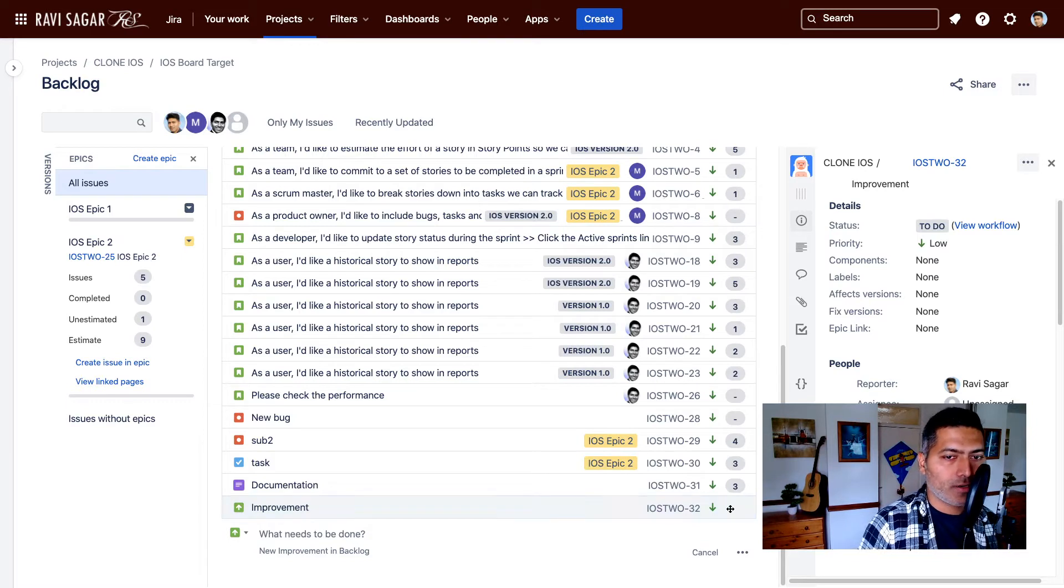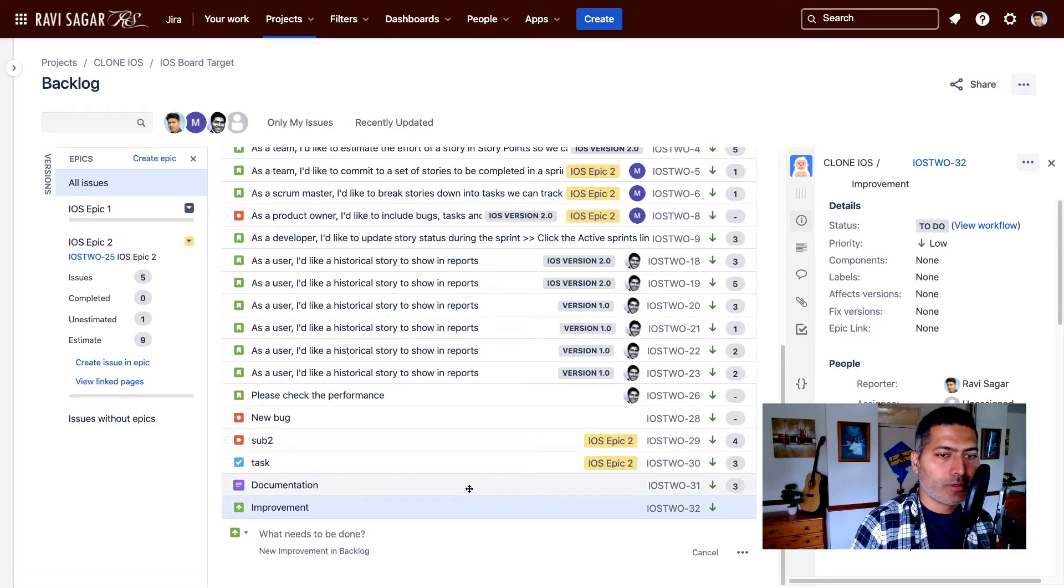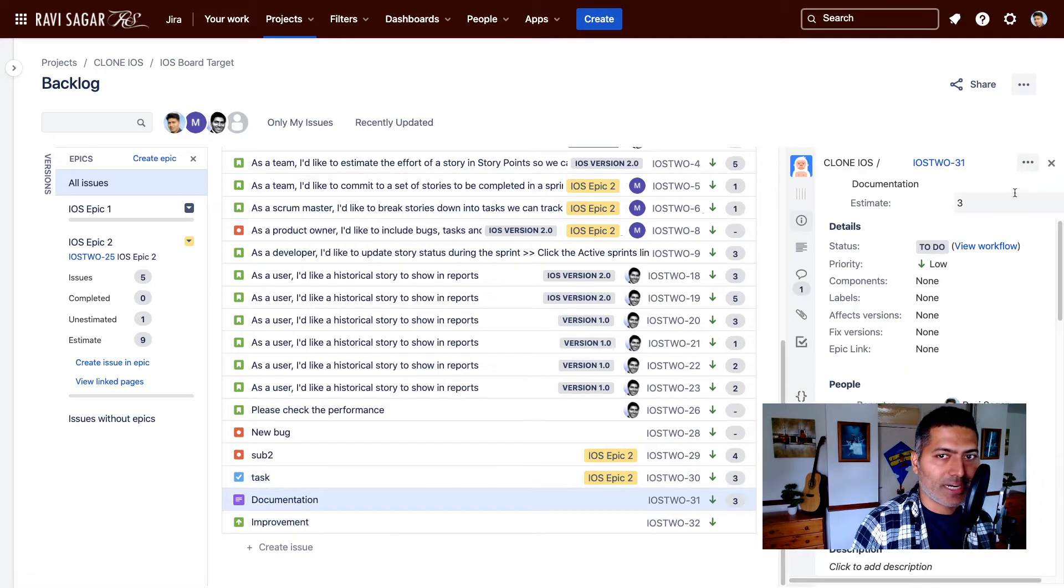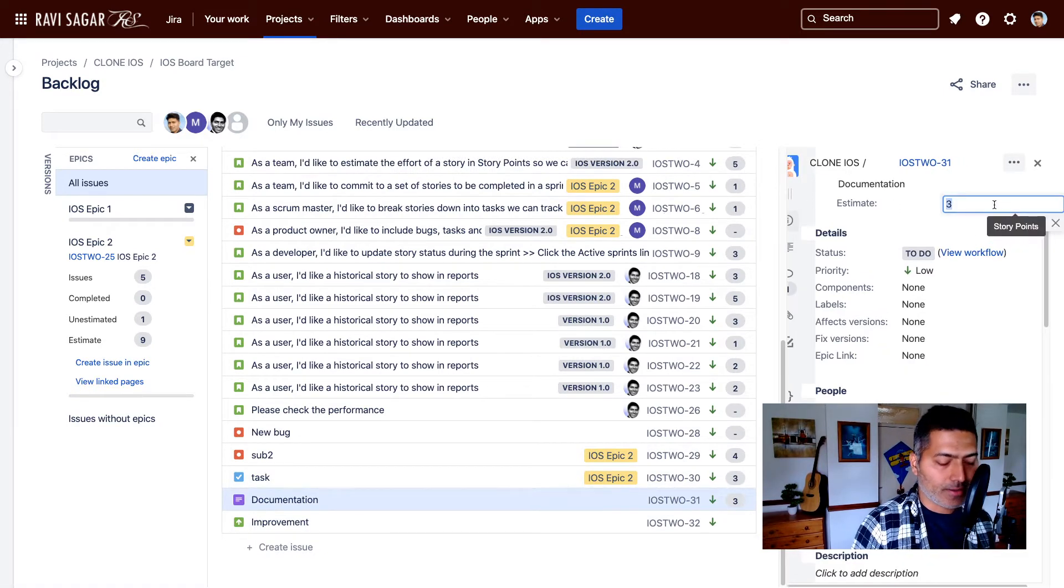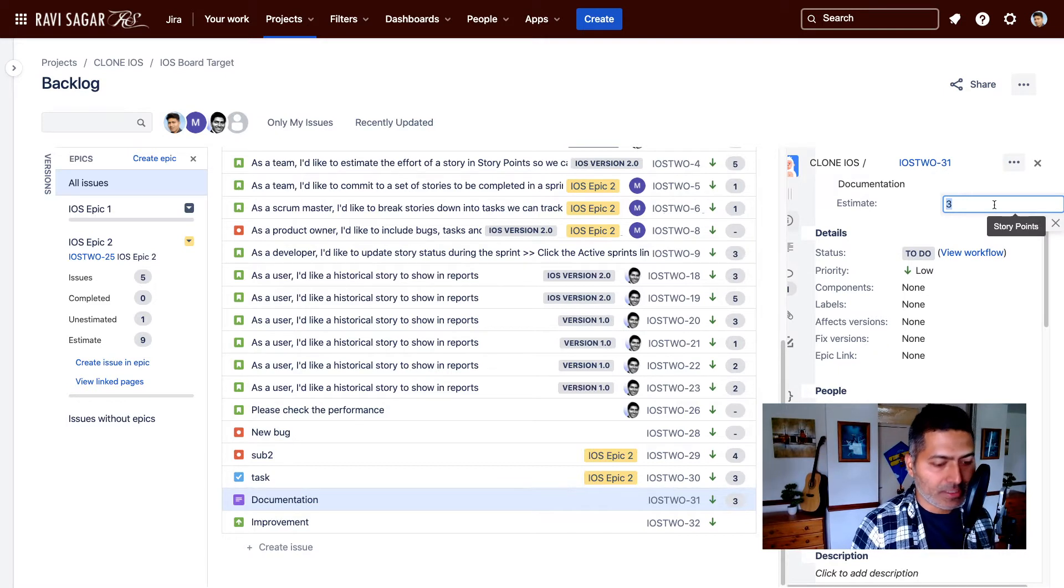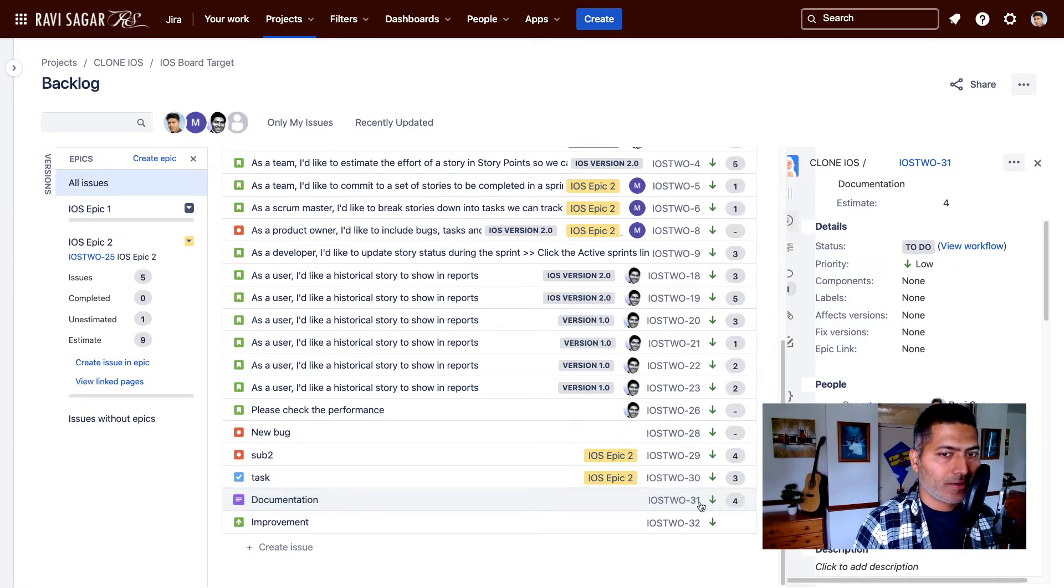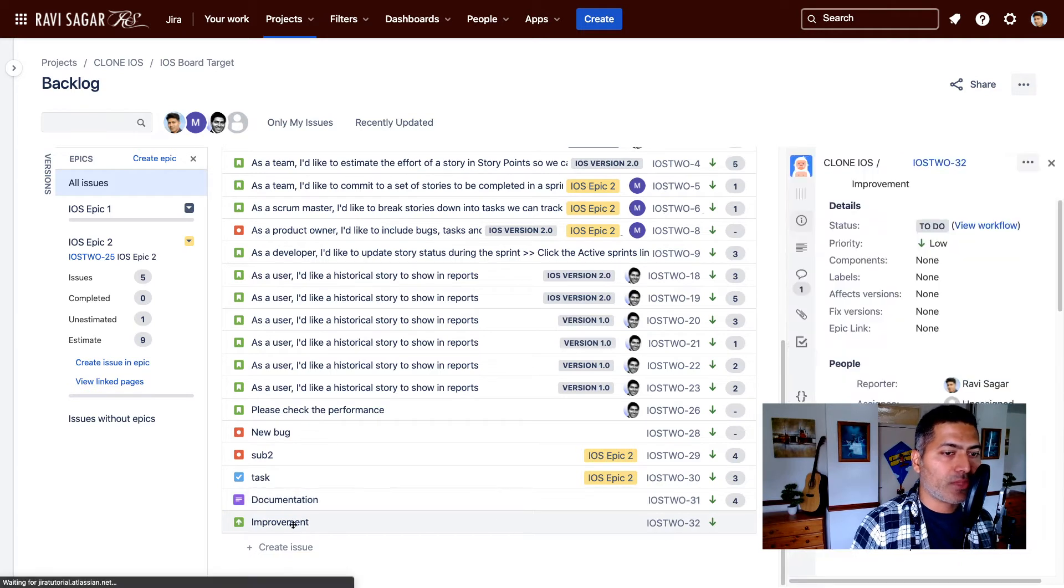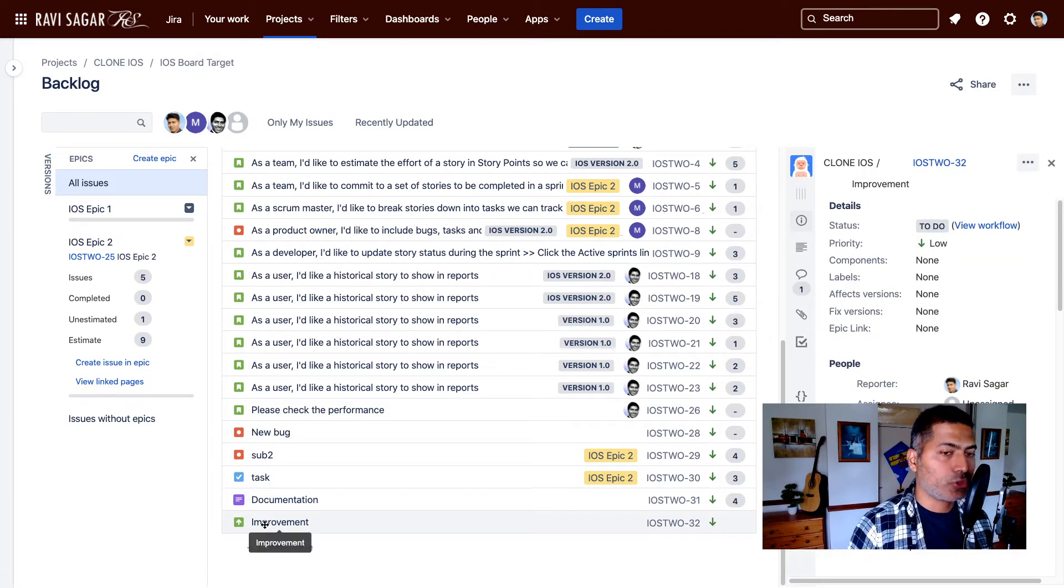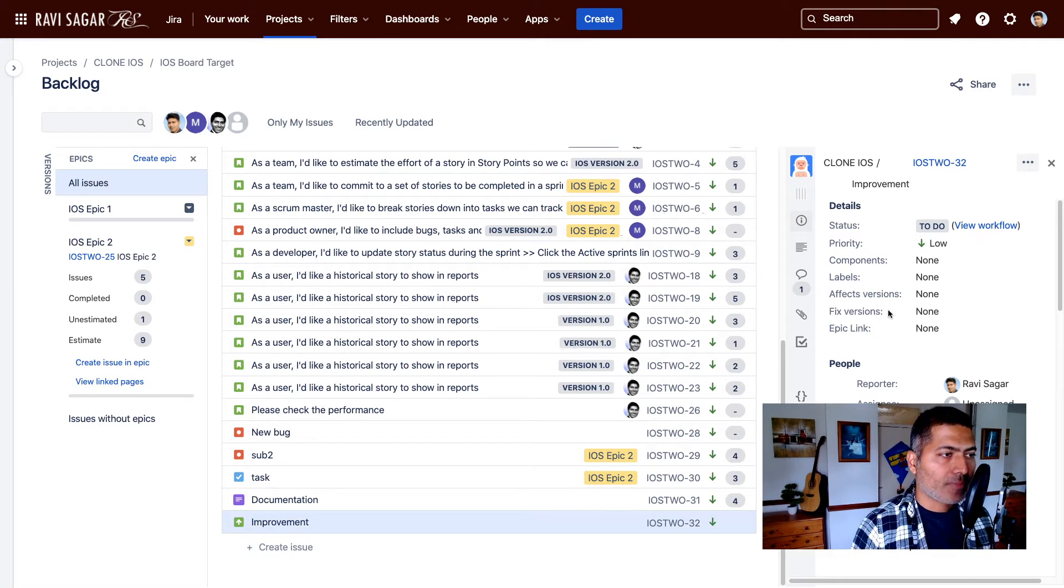Now if you look here, I do have the option for other issue types to estimate. I can estimate my issue to be four story points, maybe three or two, whatever you want, and this will be reflected here. But when I want to do the same thing for improvement, which is an issue type which I just added, I don't have any option here to add estimation.